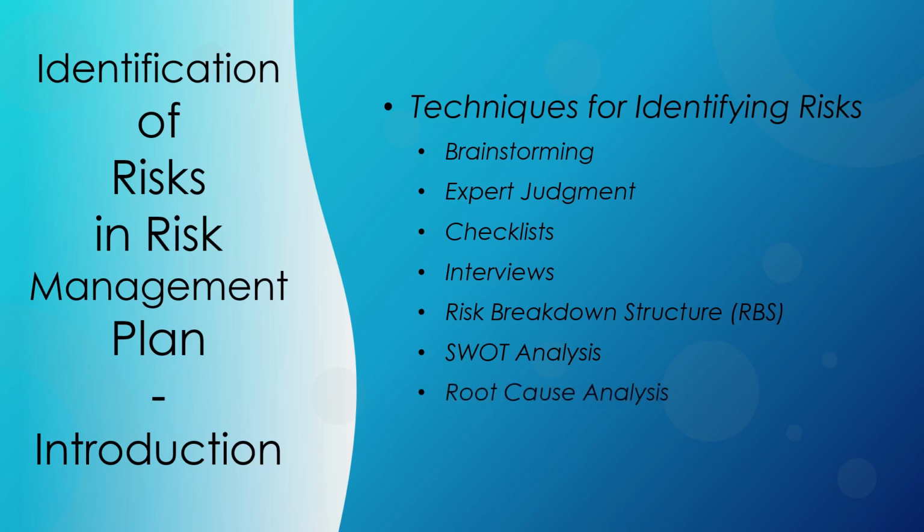Root cause analysis involves identifying the underlying causes of potential risks. This technique is valuable for understanding the factors that contribute to risks and can help project managers develop effective risk response strategies. The Delphi technique involves gathering a panel of experts to provide input on potential risks. The process involves multiple rounds of feedback, with each round's results shared with the panel. The Delphi technique aims to achieve a consensus on potential risks and is valuable for complex projects where diverse expertise is needed.